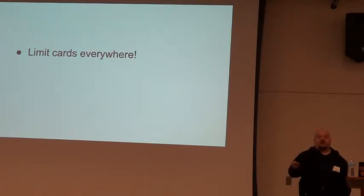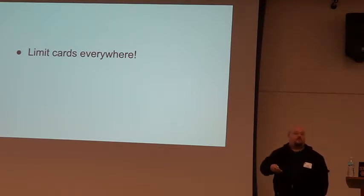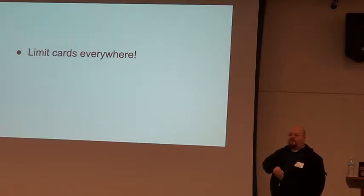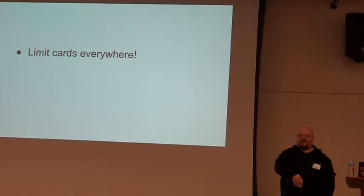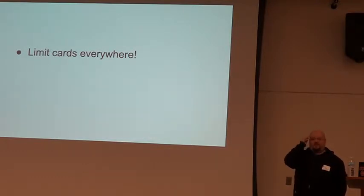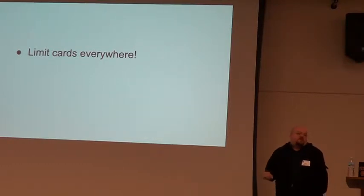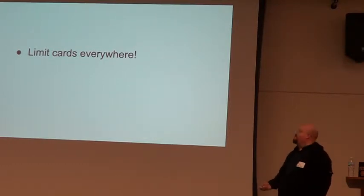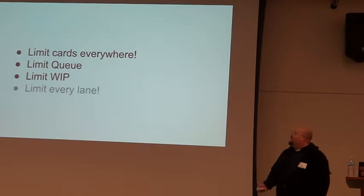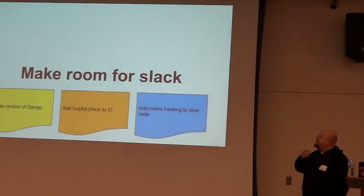And you can address things in many ways. I need more resources. We need more devs to help keep under our work in progress limits on this lane. We may have to redefine the workflow. Maybe the work in progress limit is just not sensible. We may have to change it. It just doesn't actually work in practice. It's great in management theory or whatever. And so everything will be limited.